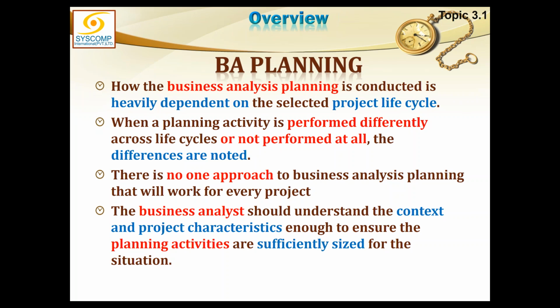So you see, we will have to create the phases according to the work of the project, not according to project management processes. Because project management processes are not unique. They will always happen on every project, and they are grossly overlapping. When you are doing monitoring and control, you are actually doing execution at the same time, and you are also replanning things.